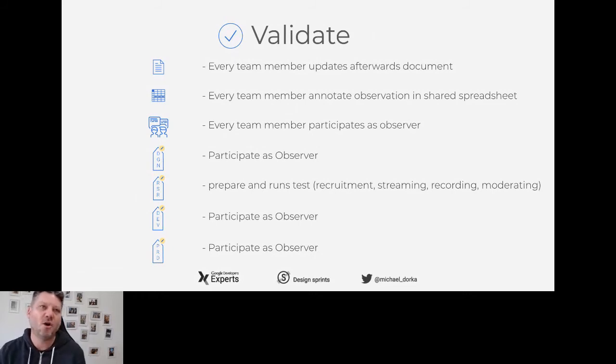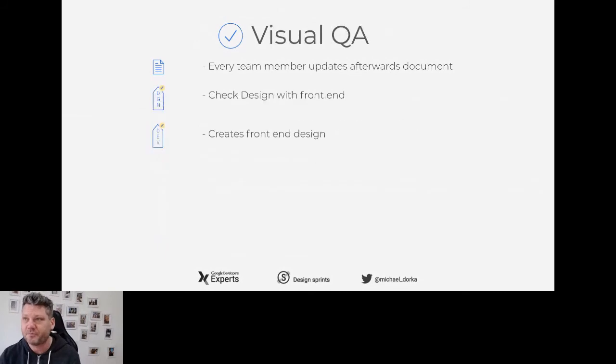So if you know that there is a specific part within the product which is difficult to code, and designers and product people say, yeah, but it is so core for the use and the user experience. But during the user testing sessions, you actually see that nobody interacts with that. You could say, hey guys, did you see? Nobody is interacting with that. And it is so difficult actually to code. Why don't we just leave it for another sprint, for another moment?